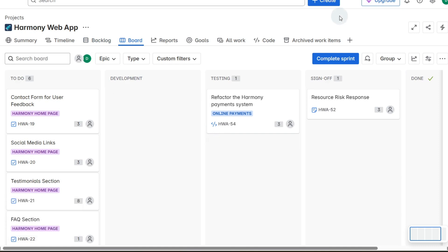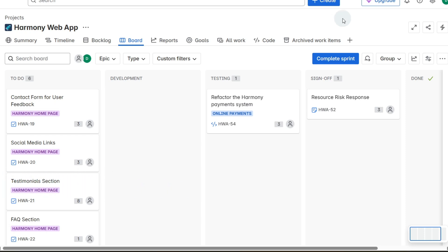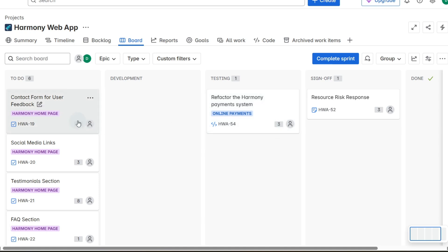Once we've done two or three sprints we can start looking at our velocity and making sure that our work matches our velocity. Our velocity is the number of user story points that we can complete during a sprint, and as you can see each of these user stories has an estimate for the amount of user story points.